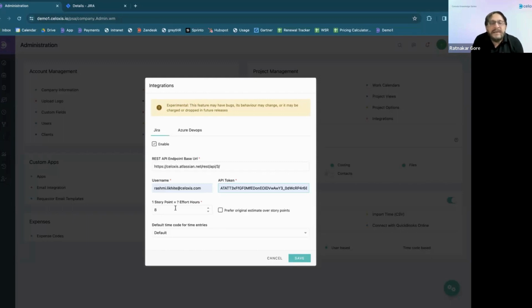Often, software development teams also use a mechanism called story pointing. So they would specify that the number of story points that it would take to complete an artifact assigned to a resource in Jira could be 2 story points, 3 story points, and that in a way signifies the complexity of that particular task that has been assigned to a resource to complete in Jira.